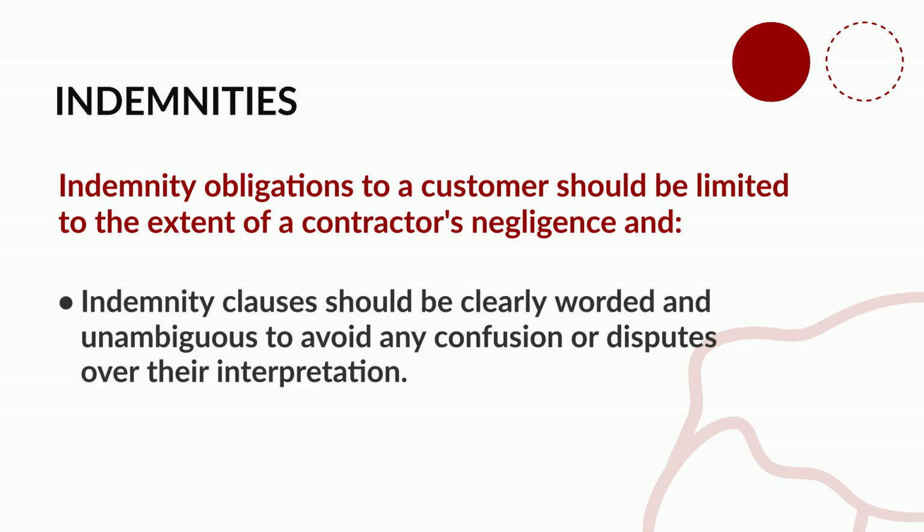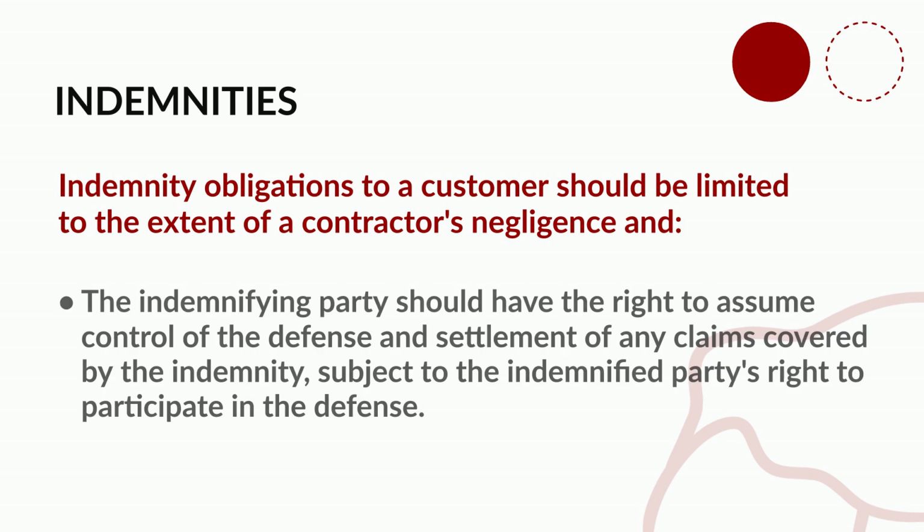Indemnity clauses should be clearly worded and unambiguous to avoid any confusion or disputes over their interpretation. The indemnifying party should have the right to assume control of the defense and settlement of any claims covered by the indemnity, subject to the indemnified party's right to participate in the defense.